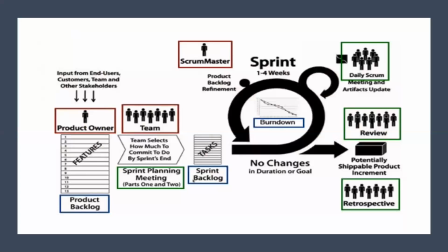Scrum Master is a new role actually, so we'll talk about that. The stand-up meeting is generally 15 minutes, and everyone reports just three things: done yesterday, to be done tomorrow, and problems or blocks. The Scrum Master notes all blocks and will resolve all the problems. Others can attend the meeting also, but they should not speak. The team has to speak and decide things. Scrum Master is the main role. This is the new role. It can be played by an existing person or a new person.